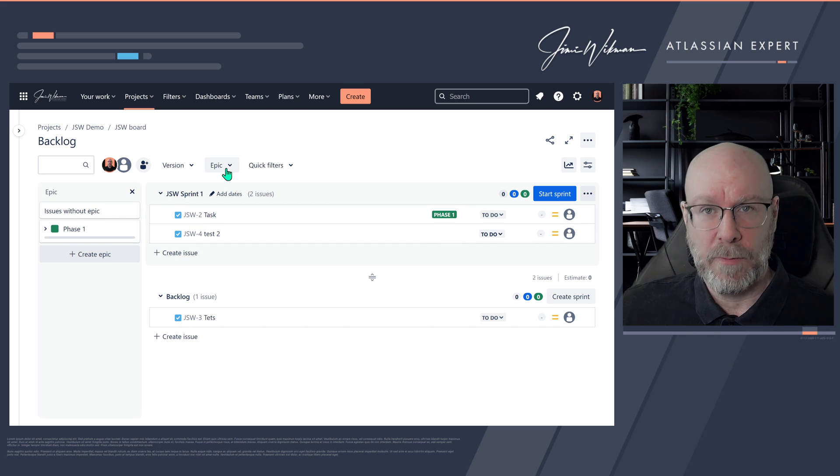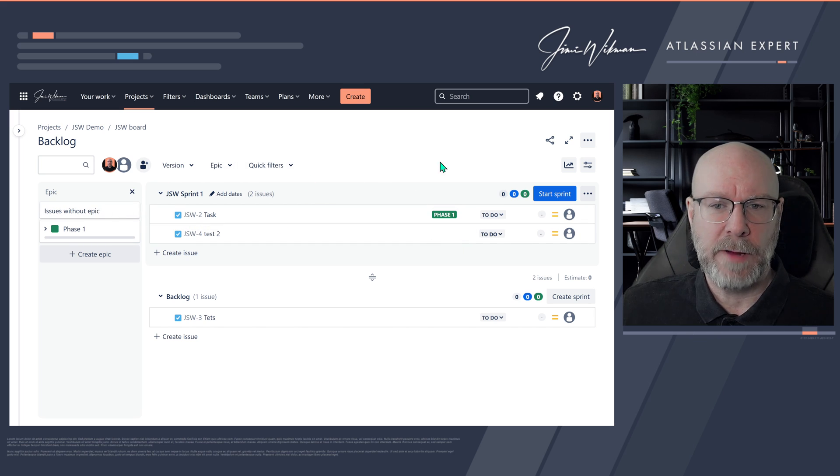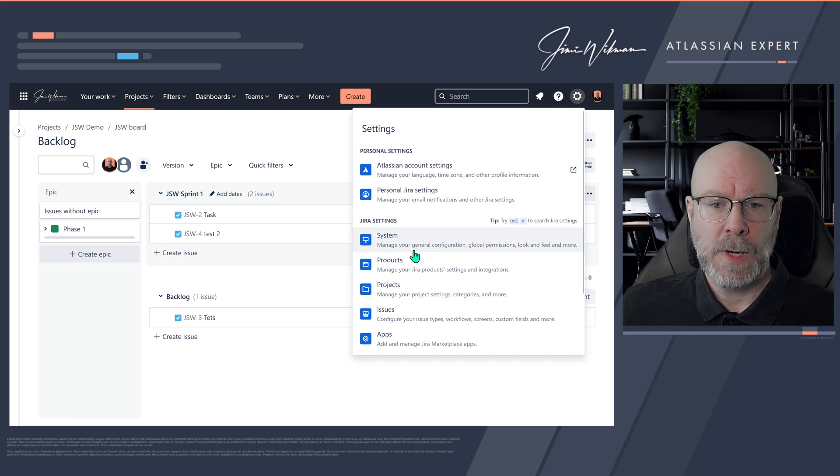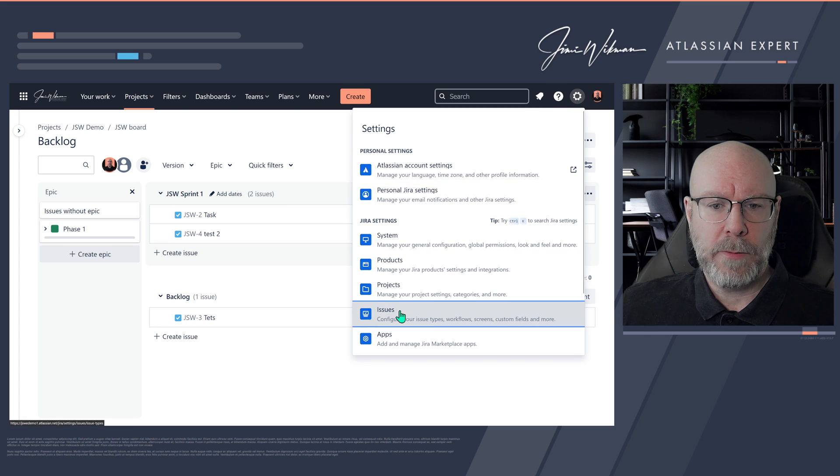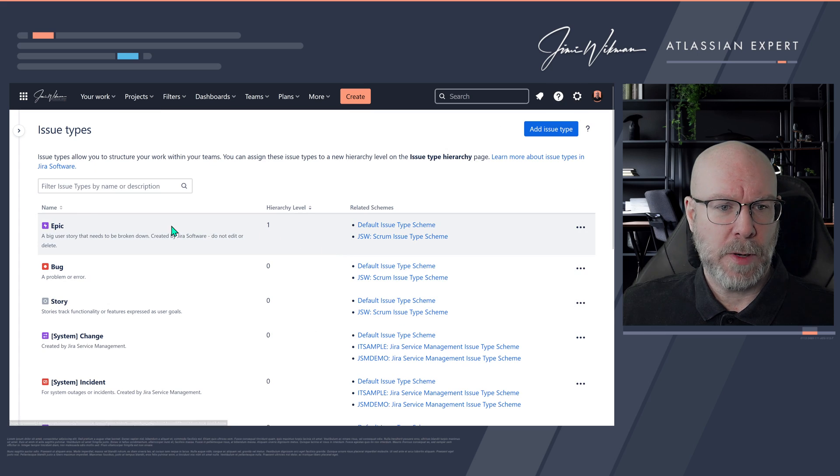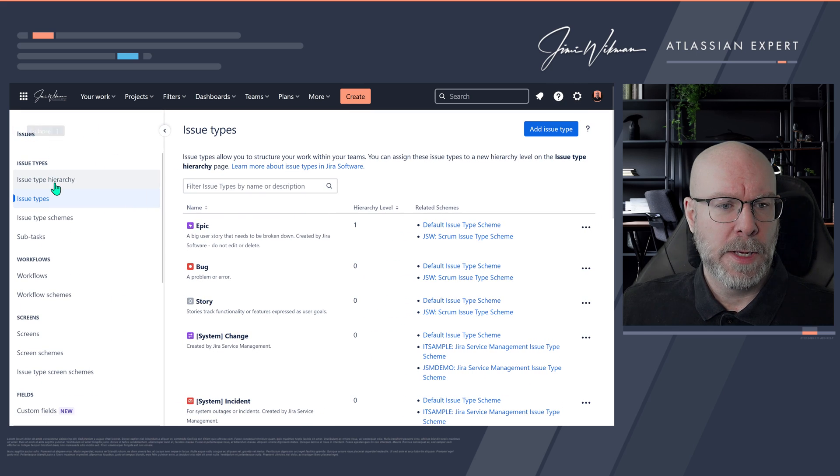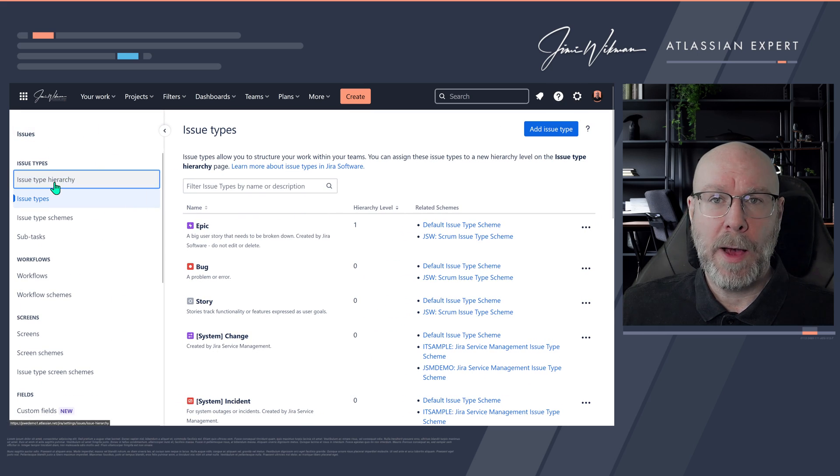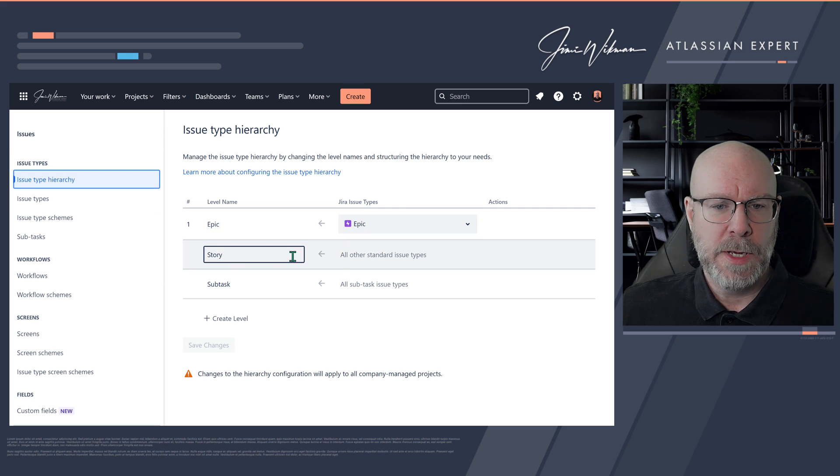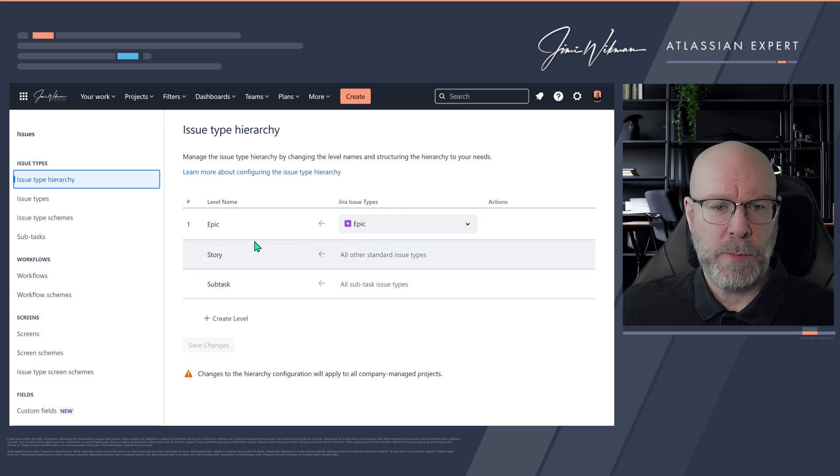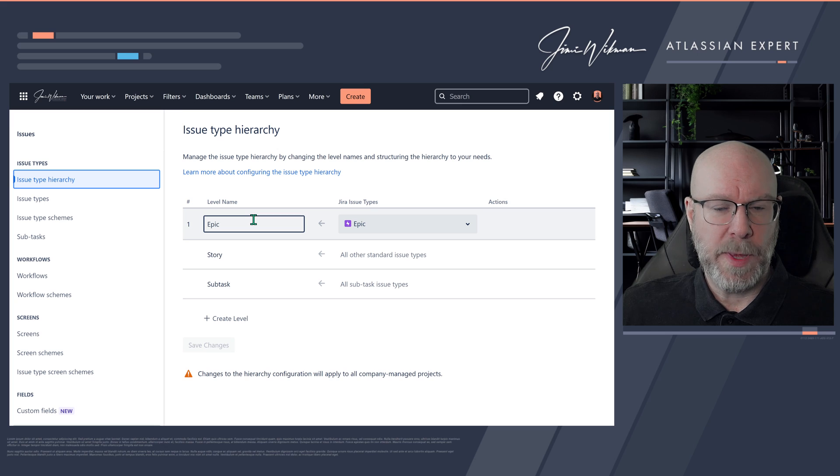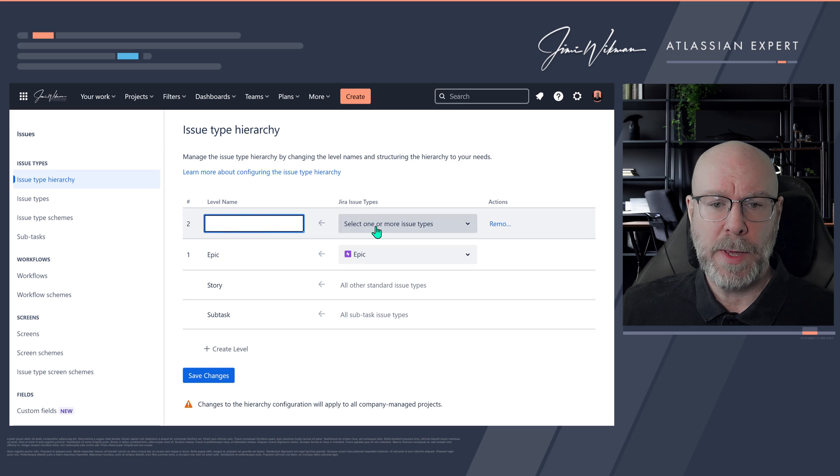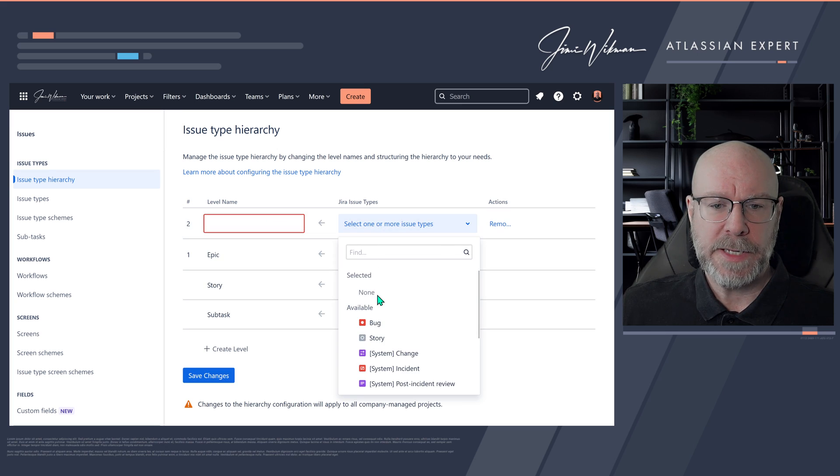So we're going to issues, we go to issue type hierarchy, and then you will see here we have the mapping of story and subtask and epic. This is where you can add a new level. If I want, I can now create a new level above epic and select which of the issues I would like to have related to that level.